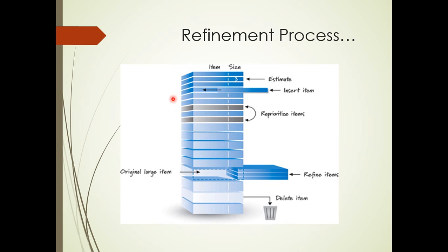The fourth activity performed in this session is removal of obsolete user stories, or user stories that have very little value or are not going to be a part of product development. If there are any user stories listed here that have been here for quite a long time, for multiple releases, and there is no chance in the coming future for them to be built into the product, then the product owner takes a call and removes all these user stories or product backlog items out of the list. That way, the product owner makes sure that the product backlog is manageable and within control.